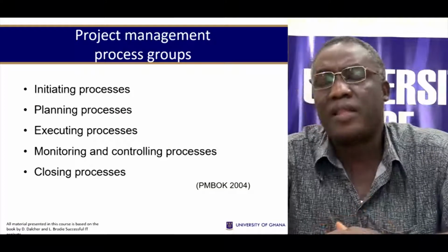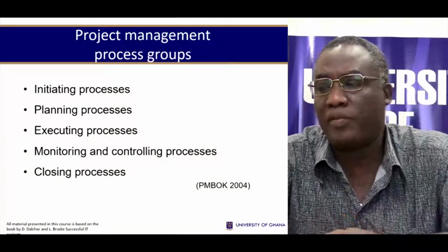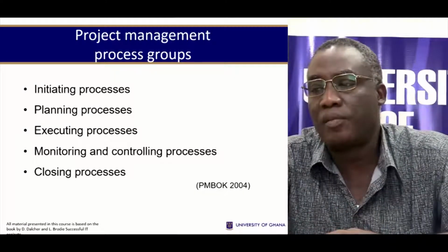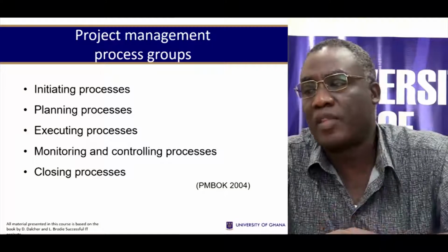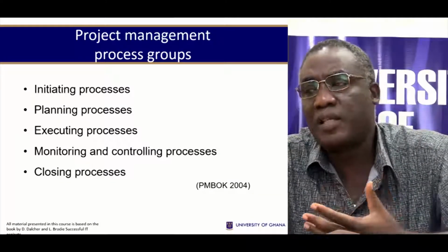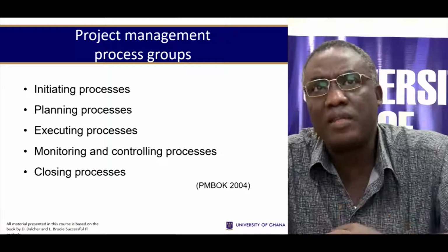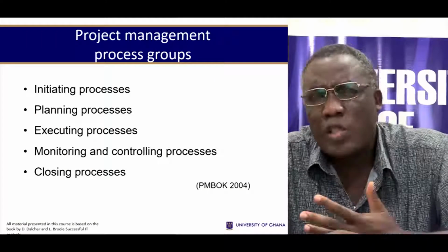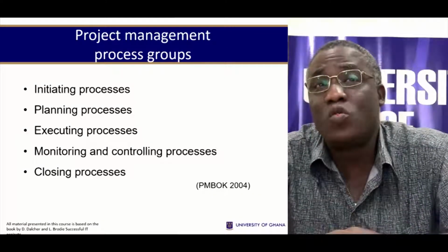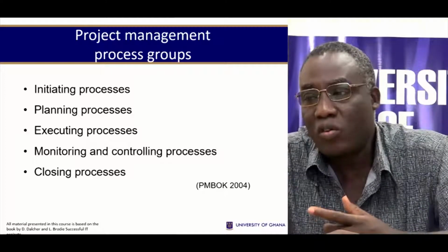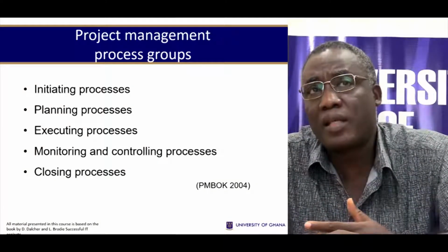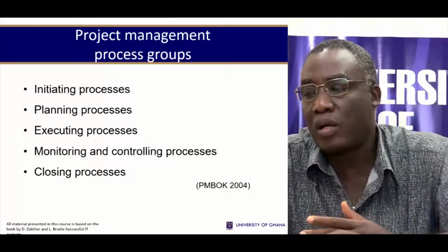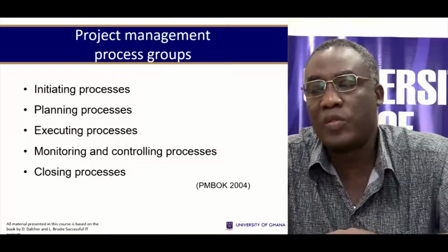There are a number of process groups that are involved in project management. So a number of processes are undertaken to bring any new project to life. This includes the initiating process, which is the feasibility study. And the feasibility study is an investigation to determine whether it is worth starting the project in the first place. For large projects, even this feasibility study could in itself be regarded as a project on its own. Items that are covered in a feasibility study would include, for example, operational costs and the value of the new system.